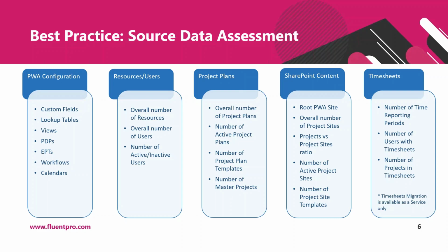As for timesheets, the following counts should be assessed: number of time reporting periods, overall number, and the number that needs to be migrated, number of users with timesheets, and it's important to keep in mind that users must have a user logon account specified for the resource in the target system in order to upload timesheets for them.